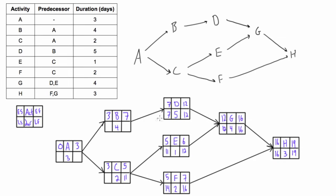For B there's only one arrow leading out, so we bring the seven in and seven minus four is three for B's late start. For C: eleven minus two is nine. Now for A's late finish, we take the smaller of the competing values — either three from B or nine from C — so we use three. Then three minus three is zero for A's late start.